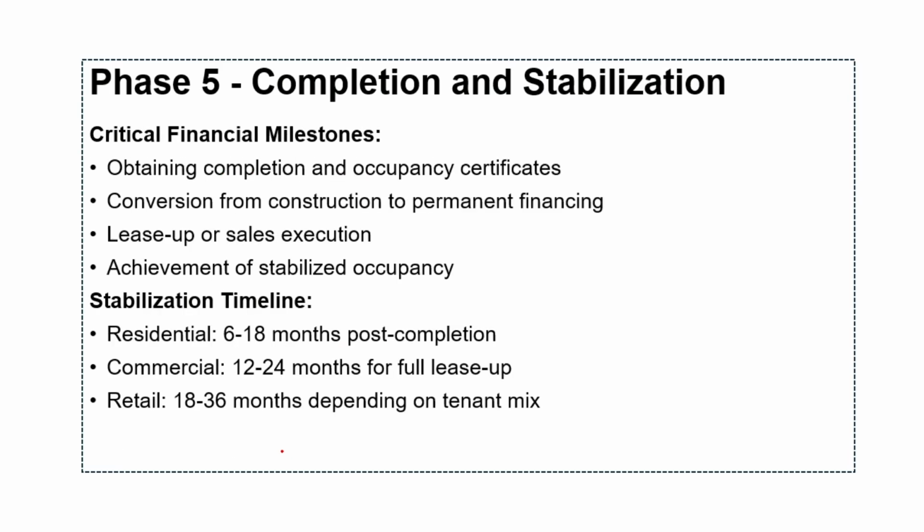Then phase 5 will be completion and stabilization. So obtaining completion and occupancy certificates will be one. Conversion from construction to permanent financing will be the second stage. And then lease up or sales execution will come next. And achievement of stabilized occupancy. Residential stabilization time will be 6 to 18 months post completion. Commercial will take a little longer, from 20 to 24 months for full lease up.